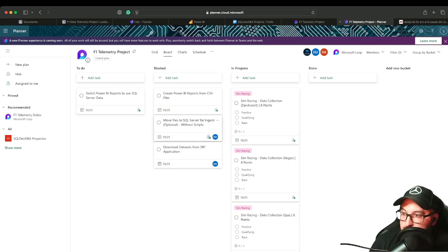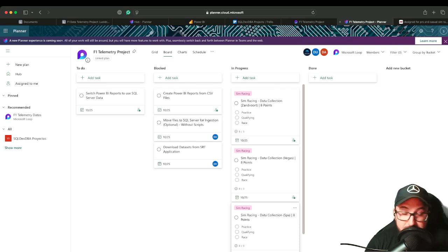So I would go to dev user, who is the DU here, and I would ask them where they are on all of their tasks. They'll tell me, hey, I'm waiting for Morse 314 to finish up their stuff before I can do mine. I'm working on some other projects, and that's it. Quick 1 minute spiel about how you're doing, and then we move on to the next. If there are any blockers, it is my job as the manager to take note of those and make sure that I address them. If someone needs a signature chased, that's my job as a manager.